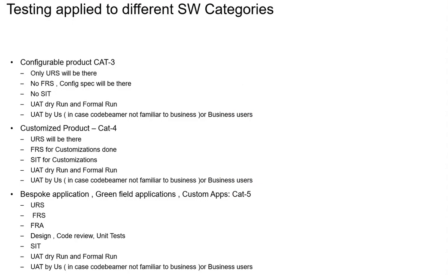And the second important parameter is the functional requirement specification. All that is specified in the URS, right? How they are going to implement it, they will illustrate the requirements at a subsequent, micro level. Those requirements talk about how exactly they are implementing each individual feature by splitting it into multiple stories or multiple acceptance criteria, whatever it may be. So those are the things we have to test at the functional level, or SIT level. Because these are all related to functionality, we have to perform functional testing, or SIT testing.